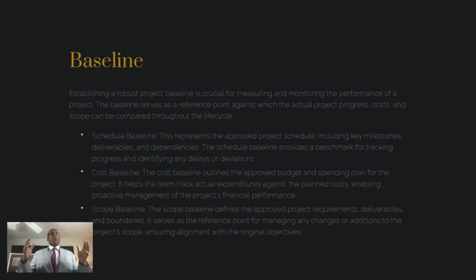This is what we're going to do. Let's lock it in. This is how I remember it: when you lock it in, you're saying, we believe that based on our planning efforts and everything we're looking at, this is where we're going to land. So you lock that baseline in, or basically lock the schedule in and say, we're going to finish on this particular date.